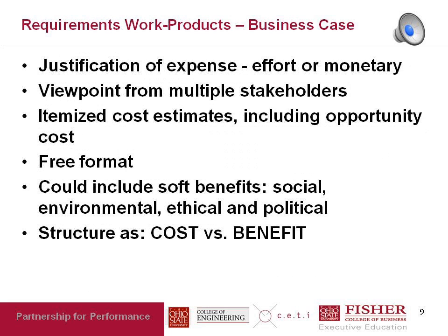The next work product is known as a business case. This business case is a justification of the expense of doing the project. So note that again. It's a justification for the expense, in terms of money, effort, people time, and so on, that will go into the project. And it is, or it should be, structured in two parts, a cost section and a benefit section. In the cost section, you have ballpark estimates of how much money will be spent, how many hours will be expended, and so on.